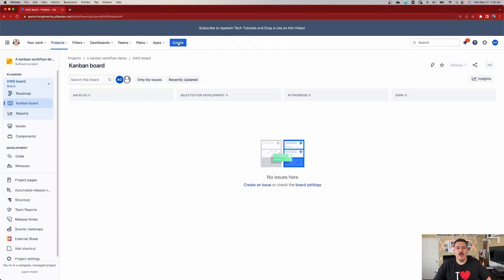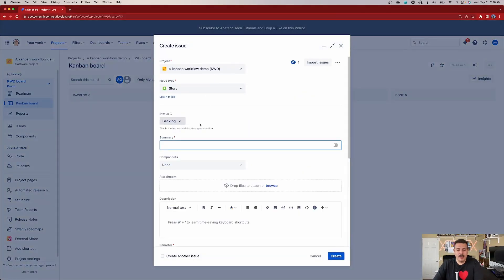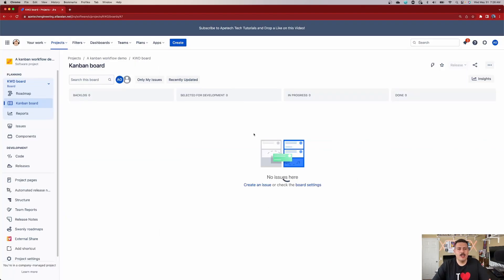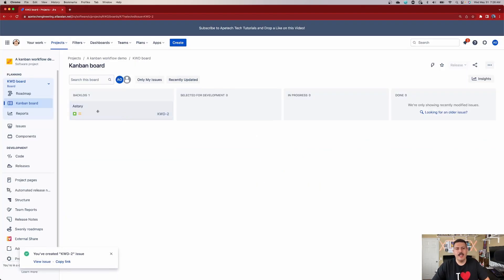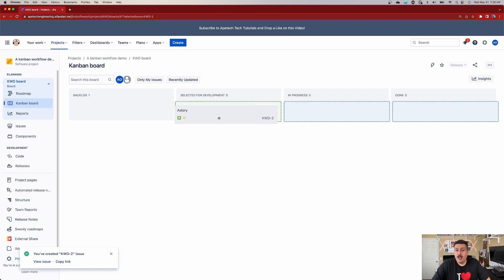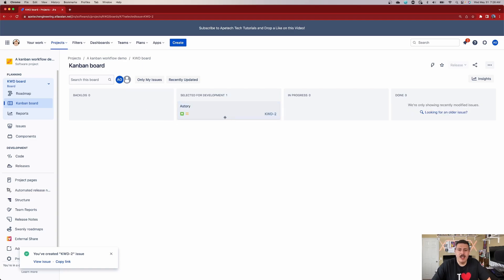Let me show you what happens when you create an issue. I'm going to create a story here, and when I click Create, you'll notice that the story is immediately in the backlog. When you're ready to start working on it, you take an item from the backlog and move it to Selected for Development, then In Progress, then Done. This is basically bare-bones — just how Jira works specifically with respect to Kanban.